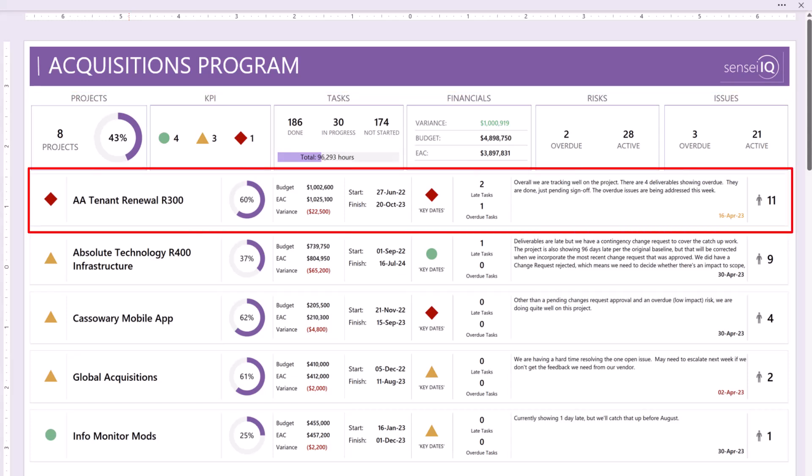Each project row first has an overall project KPI, then the name, percent complete, financials, start and finish dates, how many late and overdue tasks there are. The most recent status narrative from the project manager with a date stamp and colored for whether it's recent or getting old. Finally, on the far right is the number of requested resources for the project.